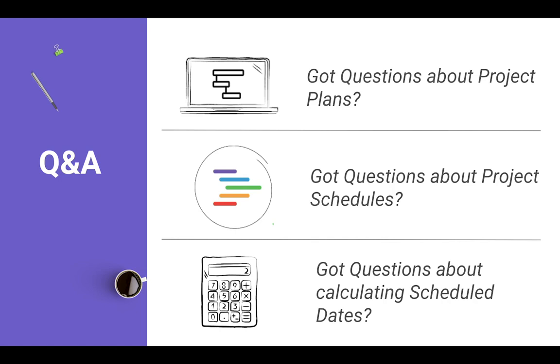While the budgeted time on that task, for example, may roll over onto the assignee's schedule if they have not completed it on time, just because that task doesn't get completed on time, there's no ripple effects downstream on other tasks on a fixed schedule. So if things aren't finishing on time on a fixed schedule, the other tasks and milestones on the project will still always auto start on their planned start date, because that's fixed.